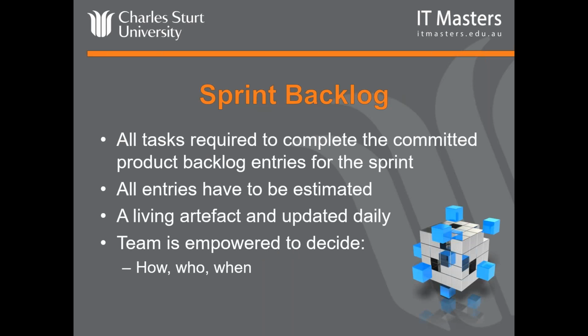One of the things we discussed last week was the sprint planning meeting, and during that the team devises the individual tasks and the low-level detail that must be performed to build the product increment and decide who will do what task. That body of work then becomes the sprint backlog, and it would be on a Scrum board or a task board, and that board is for the team and the stakeholders to have visibility and tracking of the tasks through to completion.